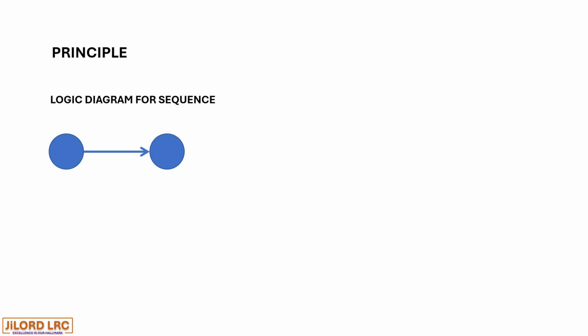The first node represents the beginning of the operation, and the second node represents the end. And the end node acts as the beginning for another operation with a forward pointing arrow to another node. That end also begins another operation with an end in between having a forward pointing arrow. This is the logical sequence of operation in line of balance.